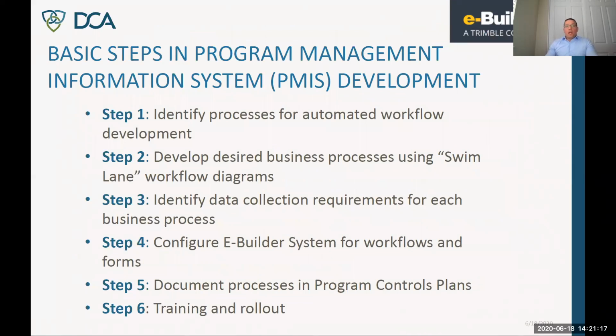For this slide, I'm going to spend the remainder of this presentation to discuss the implementation of eBuilder as our program management information system. In implementing that system, we followed 6 main steps for phase 2. Step 1, we started with the identification of which business processes would benefit best from the automation of workflows and database management for data collection and reporting.